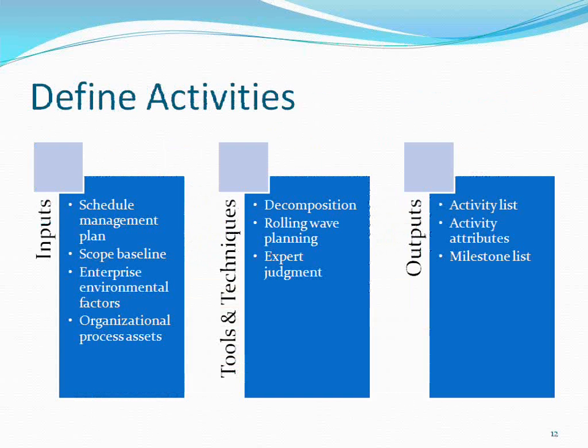So now let us see, to define the activities, what inputs you require. You require the schedule management plan. Why do you require it? It will tell the level of detail that has to be prescribed to manage your work. To what level are you going to divide this work package? You will decide that in the schedule management plan.